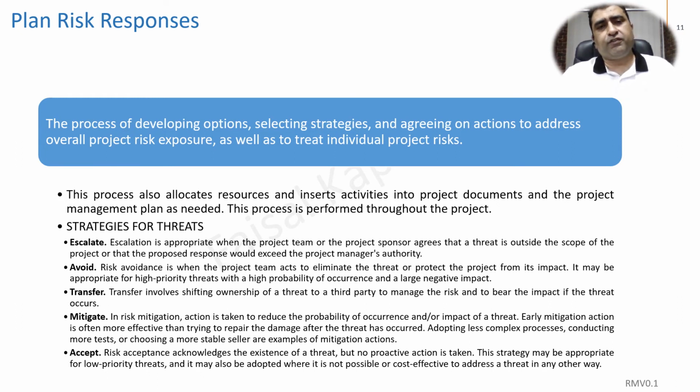And the fifth strategy that we, as project managers, may adopt is the acceptance of risk. For the low priority risks, we may go with this strategy. We accept those risks and don't plan any proactive actions or mitigation, right? We accept and prepare to bear the consequences if that particular risk becomes an issue.